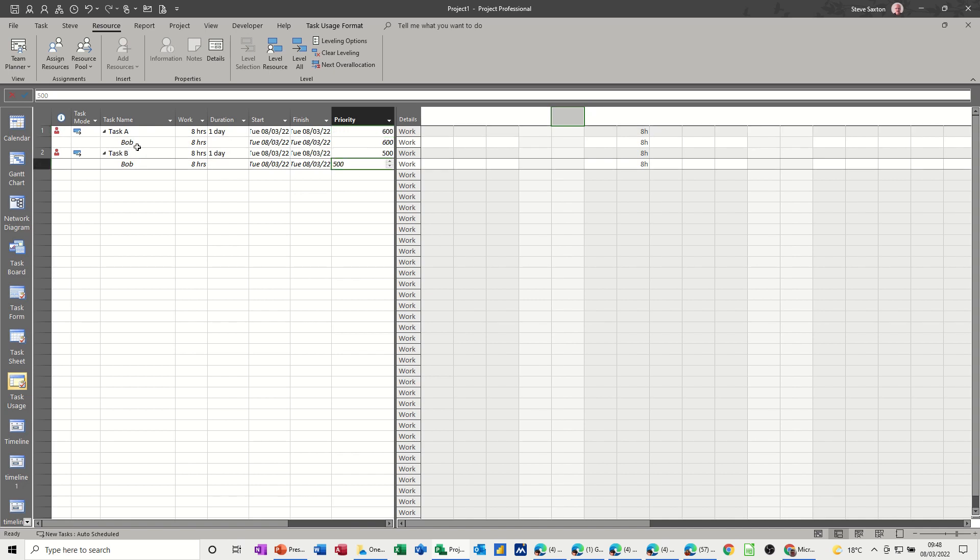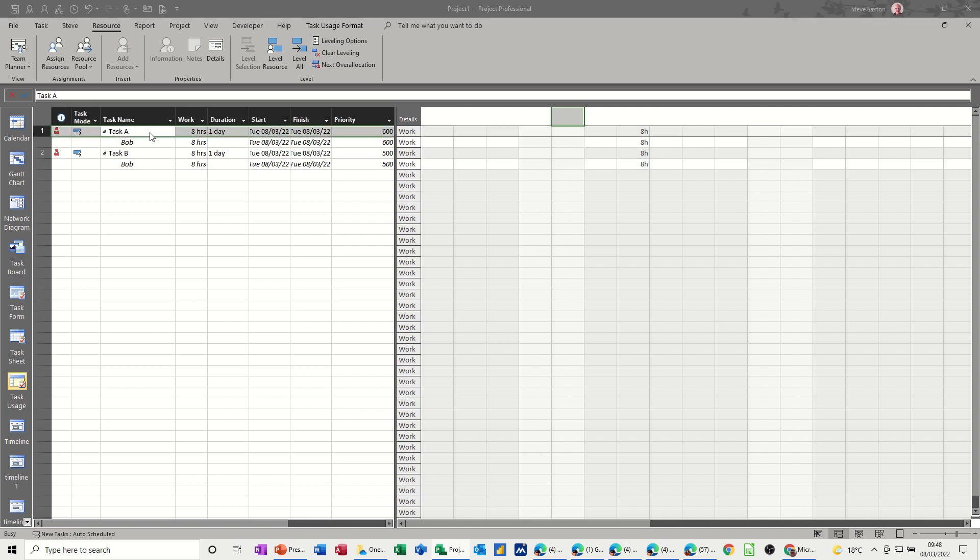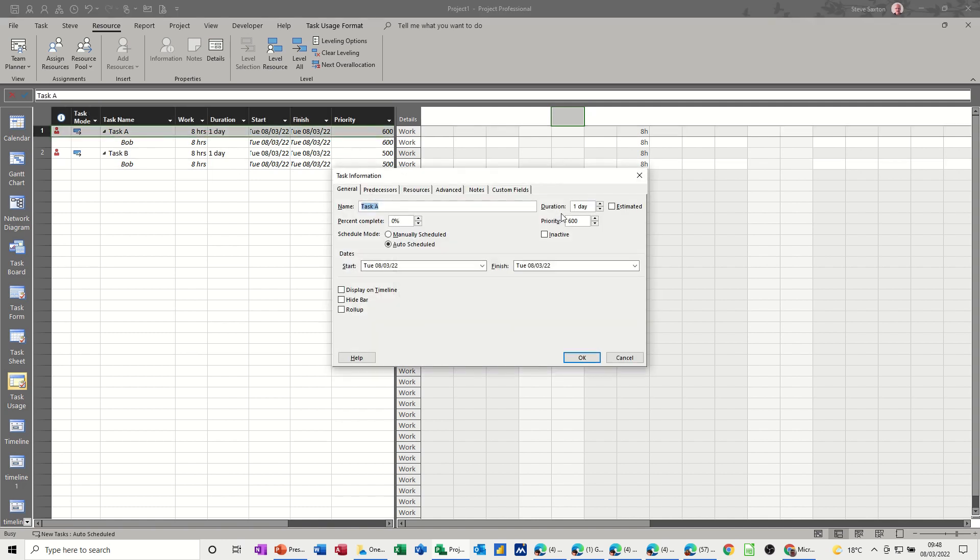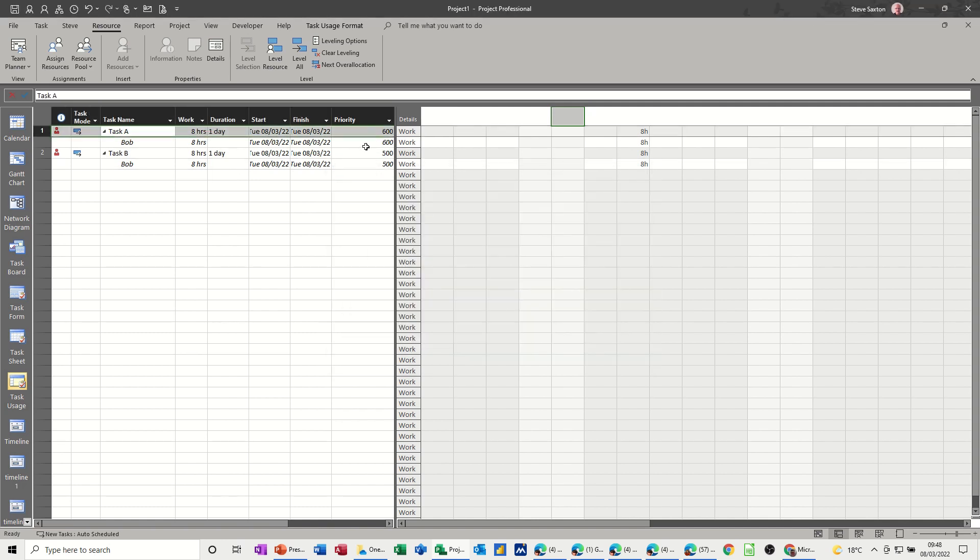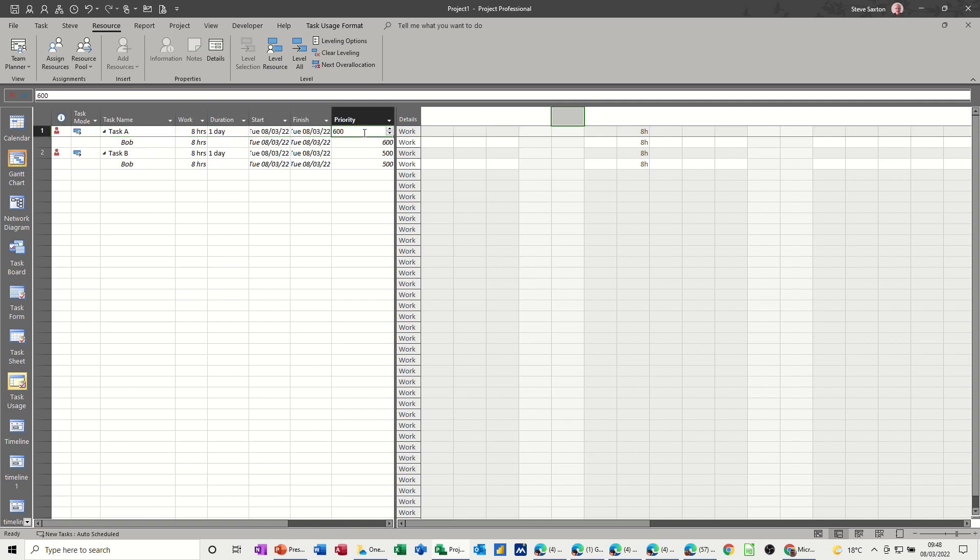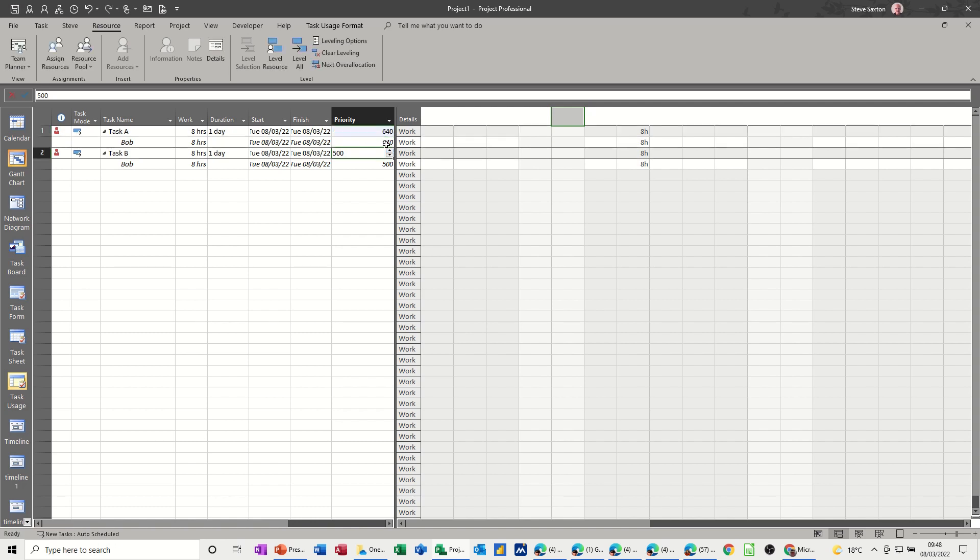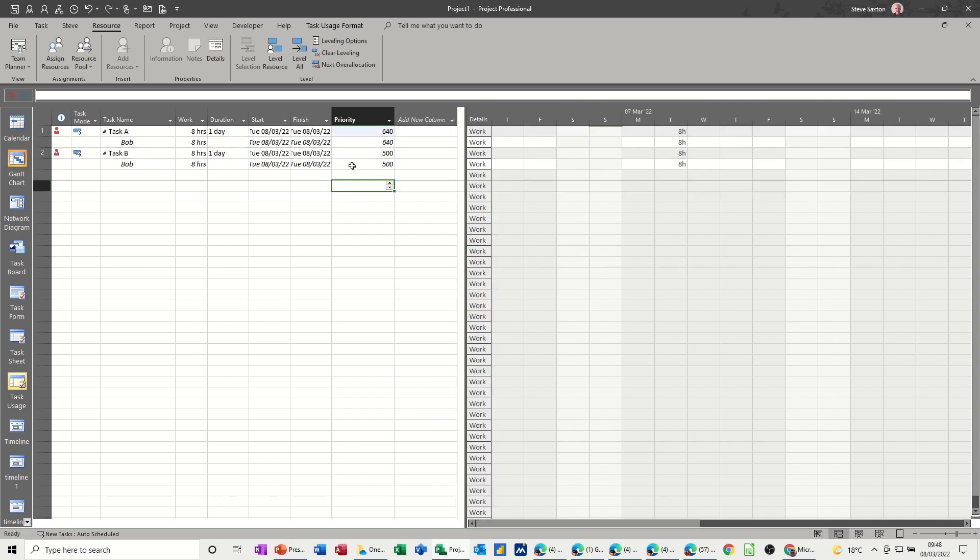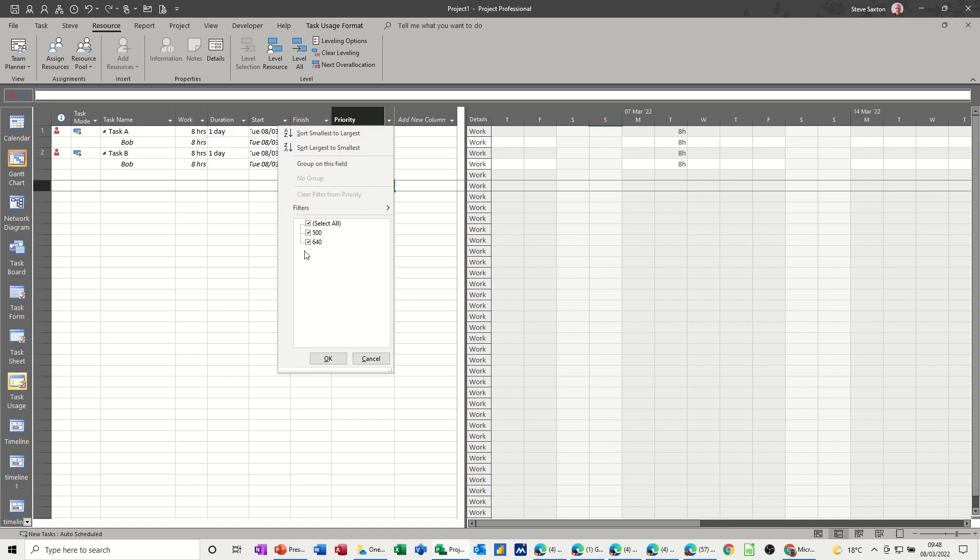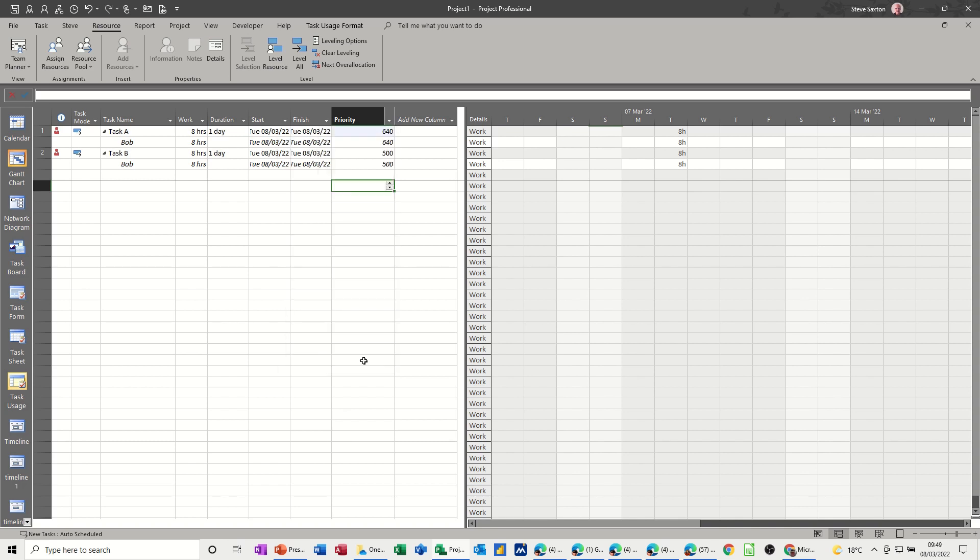And if you wanted to change that, you could double click into the task and change it there, or you could change it on the Gantt chart view. But whatever you change it to, you can't change it on the resource. It's got to be done on the task. If I change that to 640, when I click away, that's changed to 640. And what I was talking about earlier, where you can use this, if you're not using it in leveling terms, which I am, but if you wanted to, you can obviously, if you had different ranges of priorities, you could then filter these and then maybe do something with those tasks if you're going to use that as a management tool. So that's basically what the priority is.